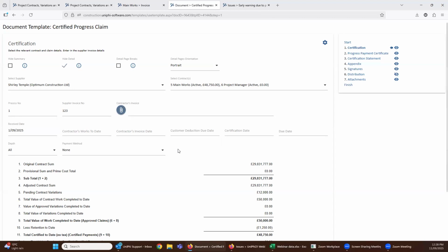And what that means is, whichever date that is, that's where the value will go into the phased actual profile of the cash flow when you're looking at the cash flow of the project. And if you're then going to use that to drive cash flow forecasting, which I showed in our phasing presentation a few weeks ago, you want it to be as accurate as possible, but your client might have different requirements as to how you're going to recognize actuals. Anyway, that's an aside. So that's a new date field that exists.